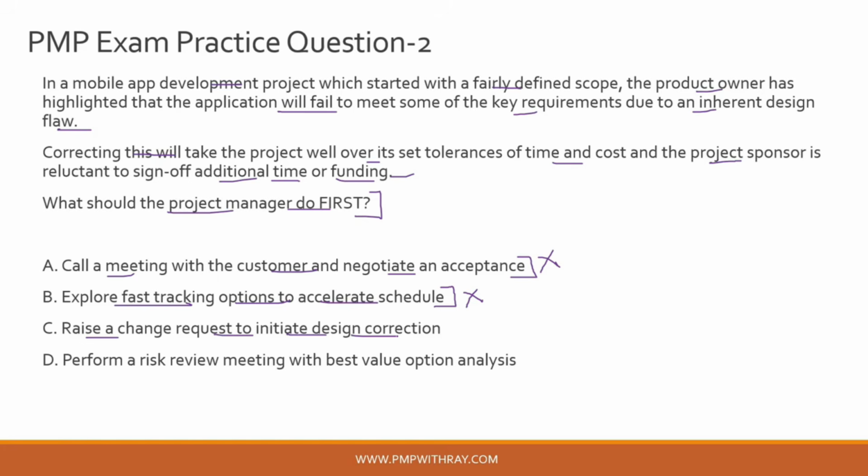Now, this may look like a feasible approach on the face of it, but consider this, that once you raise a change request, there is additional time to process the change request, to evaluate the change request, to ask for additional funding at the end of the change request, or maybe additional time, etc., etc. Okay, so it's a fairly long drawn process, guys, and for that reason option C is also not a very feasible option to me. Okay, so I will eliminate option C as well.